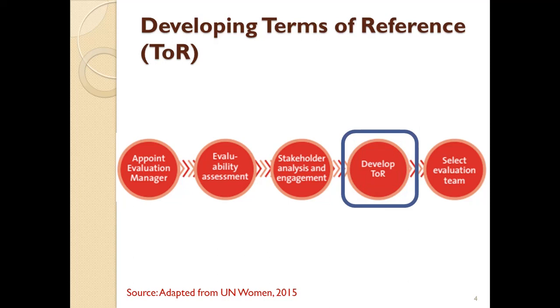terms of references. So again, reminding ourselves that while preparing for evaluation, we begin with appointing the manager who will lead, coordinate, and also participate in mobilization and all other activities related to evaluation. And then when you have the appointed manager, he can also guide and lead the assessment of evaluability to determine whether the project or intervention is feasible and the evaluation justifiable, whether the intervention can be evaluated.